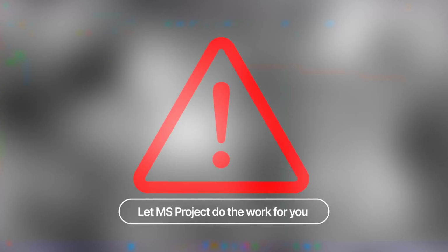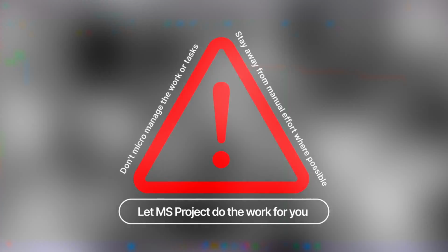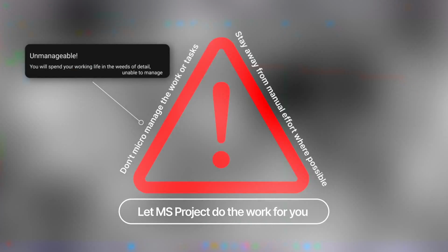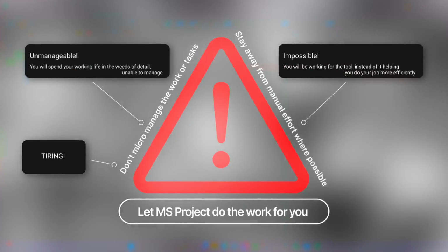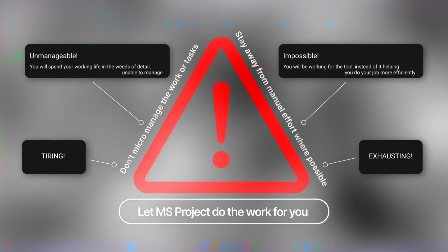Let Project do the work, especially on large, complex projects, i.e. do not micromanage tasks by manually trying to enter precise values like hours complete and hours remaining without running some type of integrated PPM tooling with timesheet functionality for your resources assigned to your project, because this will quickly become an unmanageable, impossible, tiring and exhausting task. So as I said, let Project do the work.